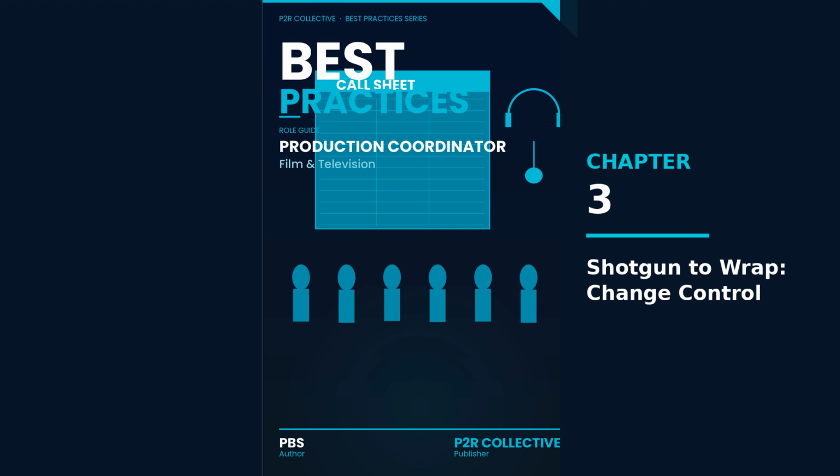1. Record the trigger, 2:10 p.m. Priya logs, client note, hold scene 12 clean plate pending approval. She records who told her and the exact effective timing, before scene 12 start. 2. Classify impact. She marks it as gate change, approval gate, plus timing change, because it blocks the 5 p.m. pickup.